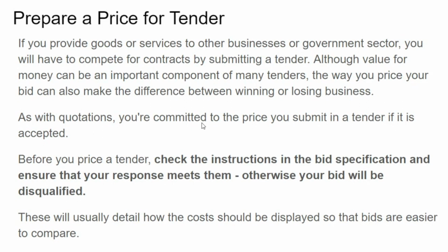Government and large companies use tenders all the time because a tender will lay out the specifications. Here are the exact things we need to do. So it forces specifications. It would also ensure that the taxpayer, in the case of government, gets the best possible deal. The tender is going to bring in a lot of quotes, and you're going to pick the lowest quote that meets the specification of the tender. So it ensures that the taxpayer is getting the best value for the money.